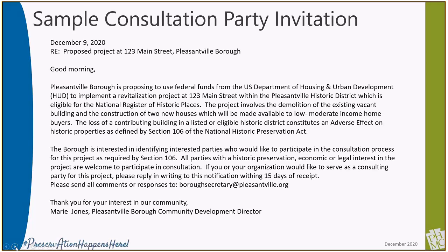You may also call to follow up with those invited to consult to request a response in writing for your files. Your email or letter documents your efforts as the federal agency to invite consulting parties and satisfy the Section 106 responsibility.